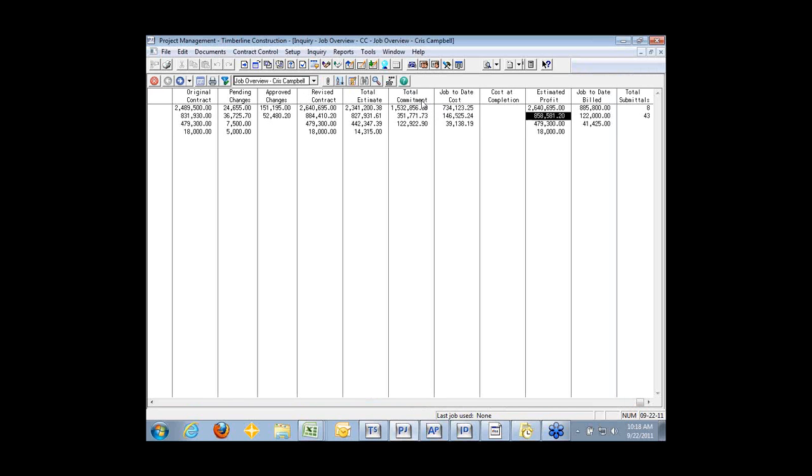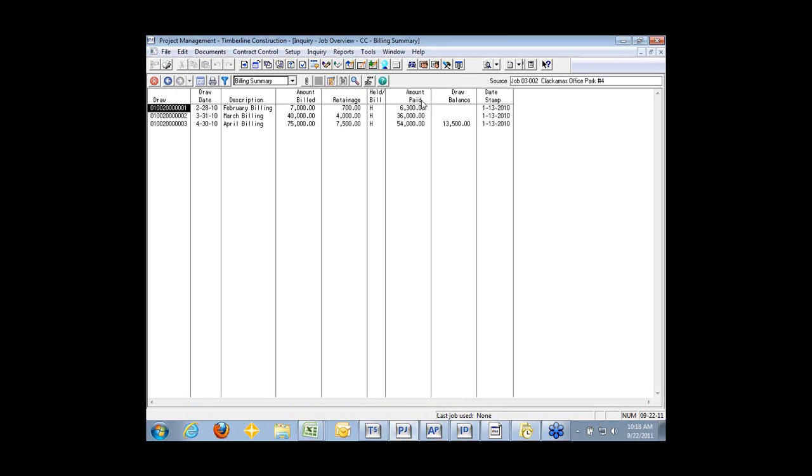So zooming back out to the main level, kind of the last two big zoomabilities is project billings to the owner. And you can hit enter and zoom in on those and immediately see that this had a February, March, and April billing. We haven't billed it in a while, obviously. And you can see the amount of the bills and the payments instantly. And you can see that this billing has a partial payment and an outstanding balance.